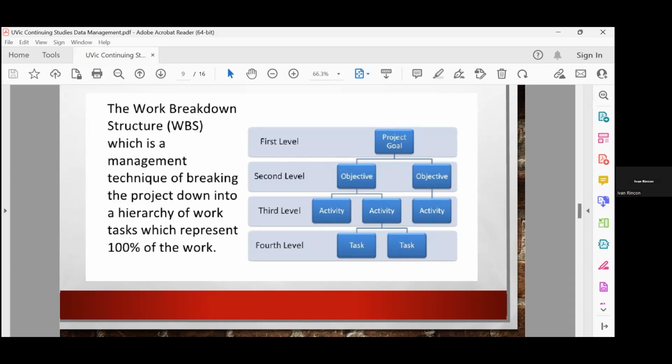Okay, so how do you create a model? Oh yeah, I need to do this. I need to do this. I need to do that. So each one of these levels is a decomposition of the bigger project. And the tool is very, very useful just because when you're done decomposing, you should have 100% of the work that you're going to perform in the project.